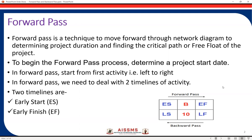ES is early start, EF is early finish, LS is late start, and LF is late finish. We are going to find out the LS and LF values during the backward pass. The first two values are calculated during the forward pass, and the last two values during the backward pass. The forward pass moves from left to right, whereas the backward pass moves from right to left.